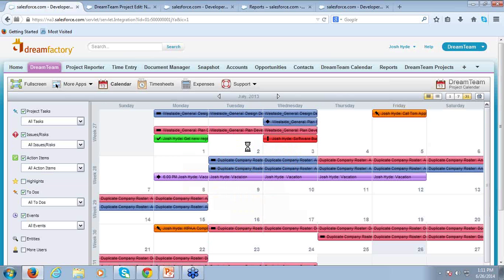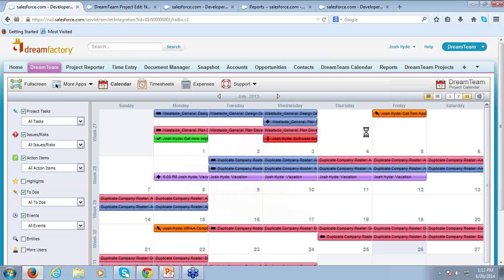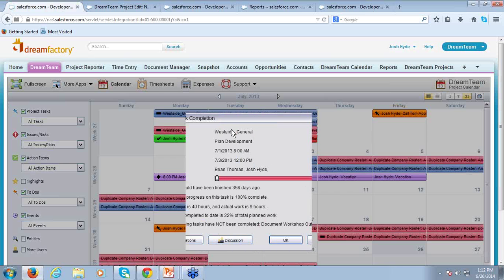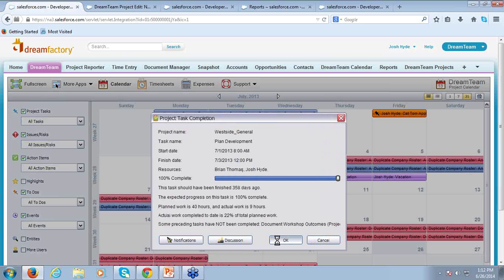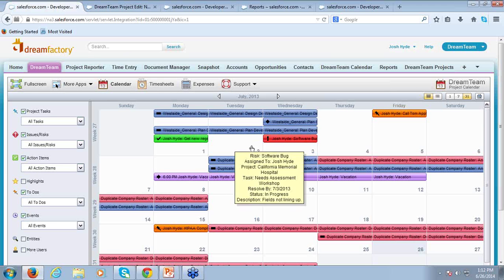I can log in as a user and see exactly what I'm responsible for on a daily, weekly, or monthly basis. I can also update the status of tasks. The blue and pink items are my DreamTeam project tasks — I can click on these, update the status, and if I've completed one, hit OK. That's going to turn to blue on my calendar showing the task has been completed, and it's also going to turn to blue on the Gantt chart and alert the project manager.